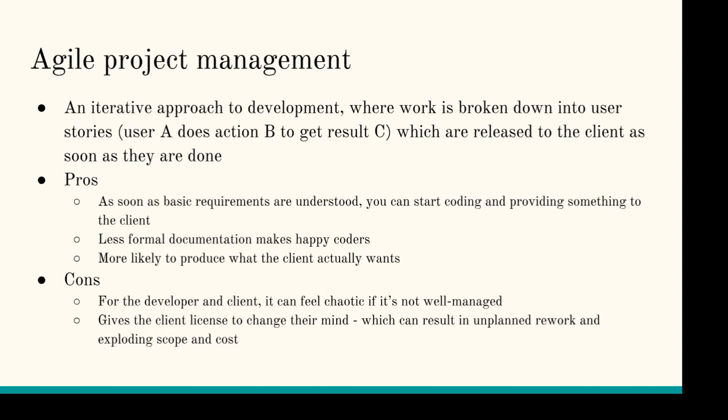And it also gives the client license to change their mind. Like, you're agreeing up front that the client may not agree to what we show them, which can result in unplanned rework, and exploding scope and cost. So you have to manage the client's expectations also about what you're willing to change or not change. You can't just show the client and everything that they say they disagree with, you're not necessarily going to be able to say, okay, sure, we'll do that, because you'll run out of time. All right? So there's a little bit more management that's required throughout the entire process with the client.